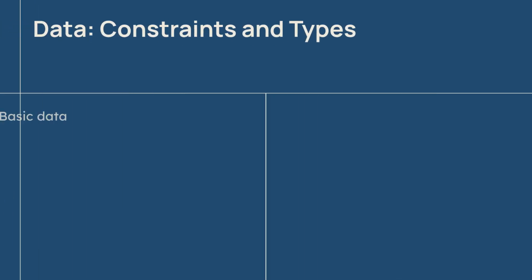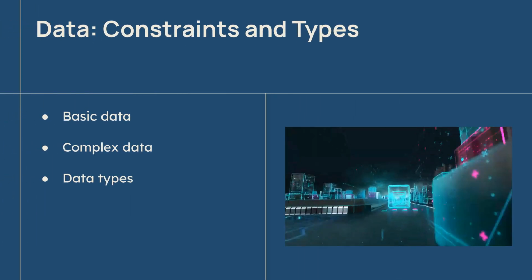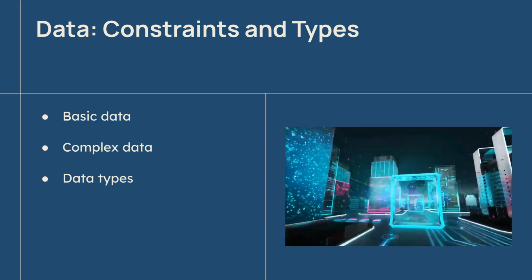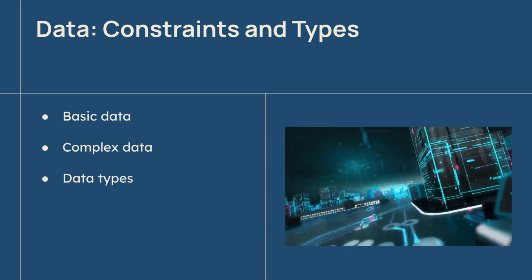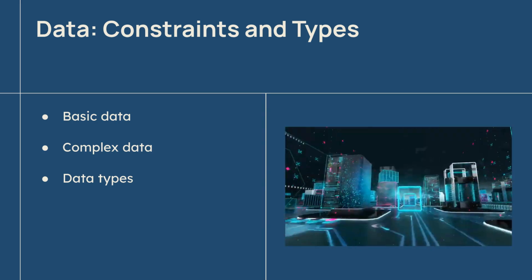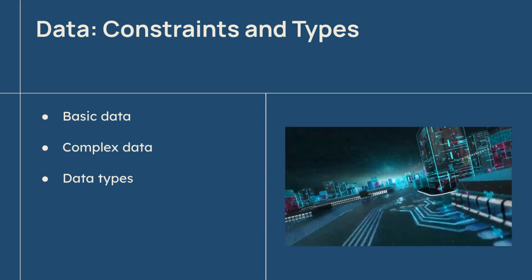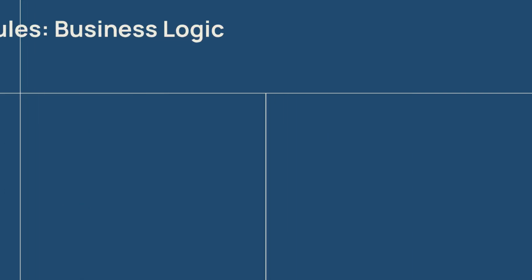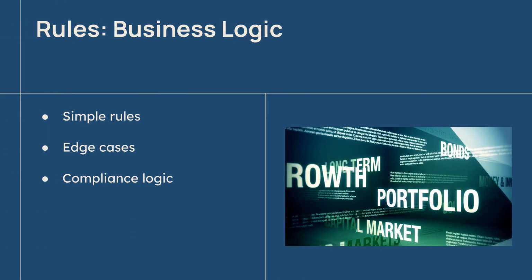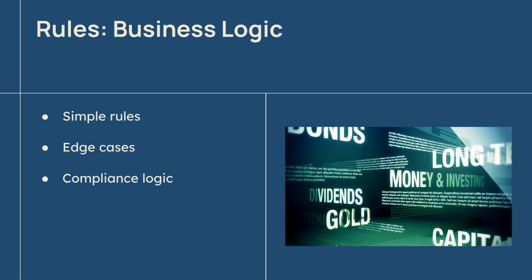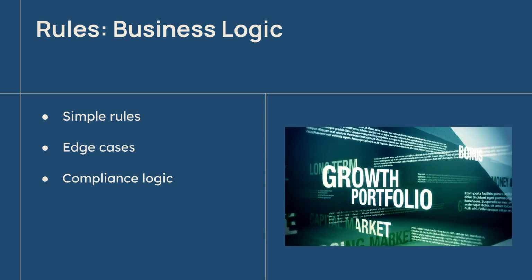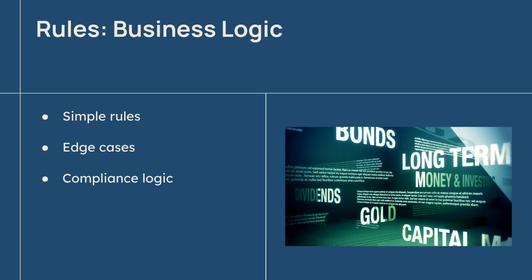Data slicing involves isolating stories based on data types or constraints. For instance, handle text inputs first, then later handle image uploads or basic user profiles before integrating complex external data sources. Rules-based slicing focuses on complex business logic. Implement the basic happy path rules first, and then address the more complex edge cases or compliance rules in subsequent separate stories. Let's walk through an example of applying these techniques to transform a massive feature into manageable, sprint-ready stories.